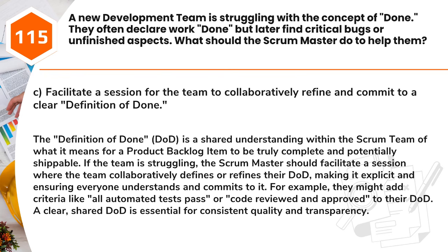Answer, C. Facilitate a session for the team to collaboratively refine and commit to a clear definition of done. The definition of done, DoD, is a shared understanding within the Scrum team of what it means for a product backlog item to be truly complete and potentially shippable. If the team is struggling, the Scrum Master should facilitate a session where the team collaboratively defines or refines their